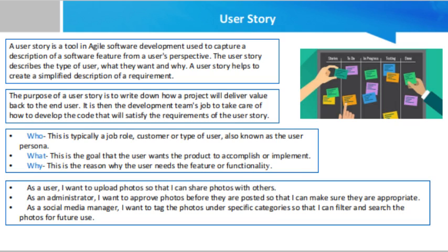The end result is a sentiment like: 'As a [who], I want [what], so that [why].' Further detail can be added to a user story by breaking it into smaller user stories and grouping them into themes. An agile user story is meant to be short, usually fitting on a sticky note or note card. The user stories should be written by the business in the language of the customer, so that it is clear to both the business and the development team what the customer wants and why.